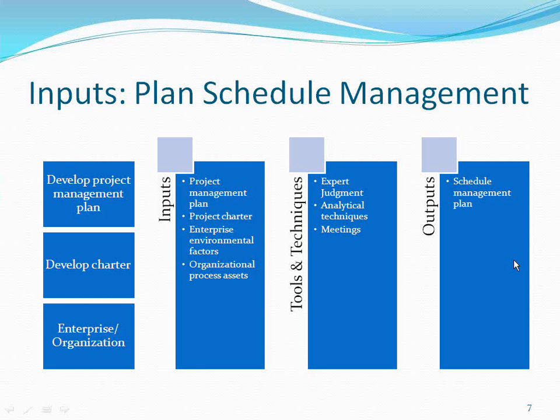As I told you, when I say level of accuracy, it is an acceptable range used in determining realistic activity durations, and it may include an amount for contingencies. Remember, whenever you plan for an activity, you have to add some buffer, some reserves to that. That's related to risk, if something happens.